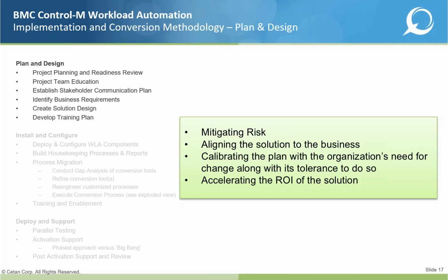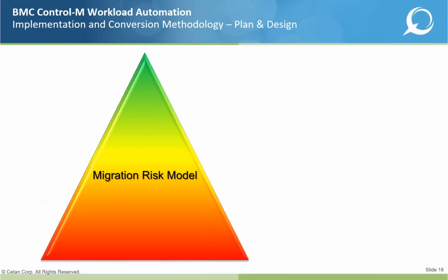We worked with others where the application developers owned the batch workload and they wanted to test everything. So even though the technical part of the conversion didn't take any longer than the first scenario, the extended testing cycles meant that the overall end-to-end time of the project was elongated. And that's not a bad thing either. It's just a matter of calibrating things based on what each individual organization needs.